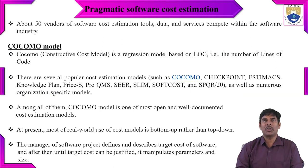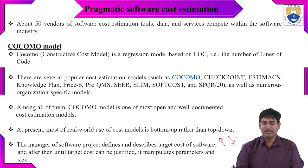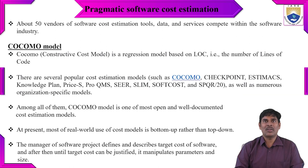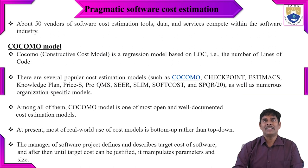At present, most real-world use of cost models is bottom-up rather than top-down. In the bottom-up approach, it goes from the bottom upward. The manager of a software project defines and describes the target cost of the software, and until the target cost can be justified, the manager manipulates parameters and size — checking different criteria to verify the target cost, with possible changes in parameters, size, and source lines of code.